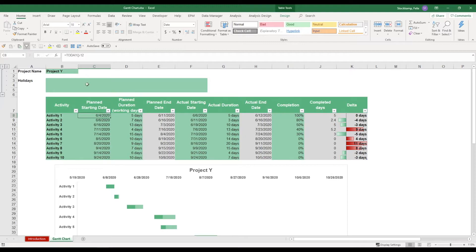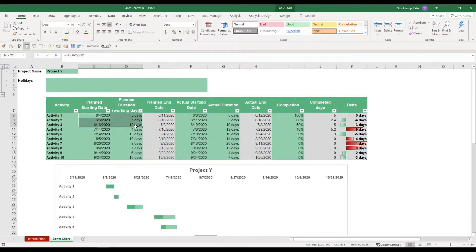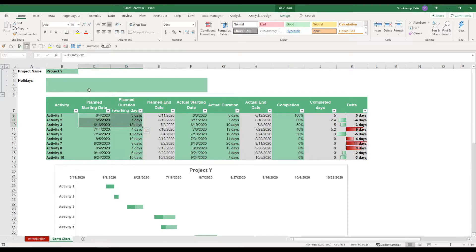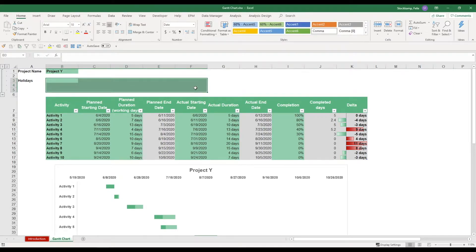If applicable, there are certain holidays that fall into the duration period of the entire project. Those could be individual bank holidays that you may have in your country or in your city even. So you can go ahead and enter them over here in this green area and they will then be excluded from the calculation of work days.